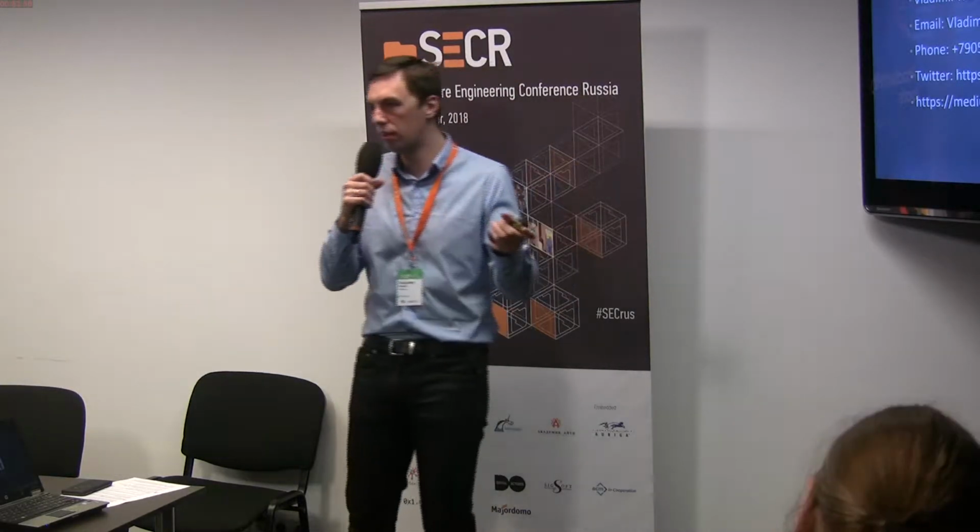But if we see that the architecture will change with that requirement, this is definitely a change order, and we're trying to communicate: this is a huge, huge change. We need to change the architecture, add another team to satisfy this requirement. So this is separate money, a separate contract, and so on. And it happens all the time. This is life. Okay? So more questions.